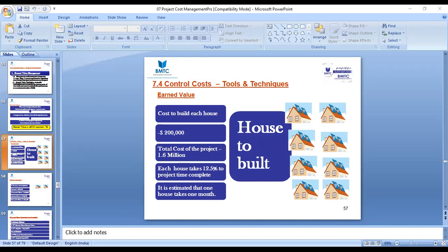If anything is coming less than 1, is it good or bad? Your SPI and CPI show it's coming less than 1, in decimals. Good or bad? Bad. It's coming equal to 1. Good or bad? On track. If SPI shows exactly 1, is it good or bad? Yes, it's good, right? Good.